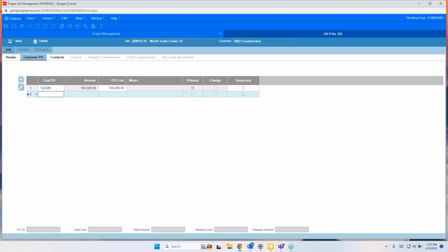So if they give me another purchase order, I can put in another dollar amount. So maybe there's another $5,000 that they're going to give me, and I'm expecting a $3,000 cost on it, and it's for some add lights on second phase, or per Jimmy or something like that. All right, so it's just tracking what happens. You can make it a change order. You can mark it as a temporary order. Maybe you think that purchase order is going to change as you go through, so you can mark that as appropriate.